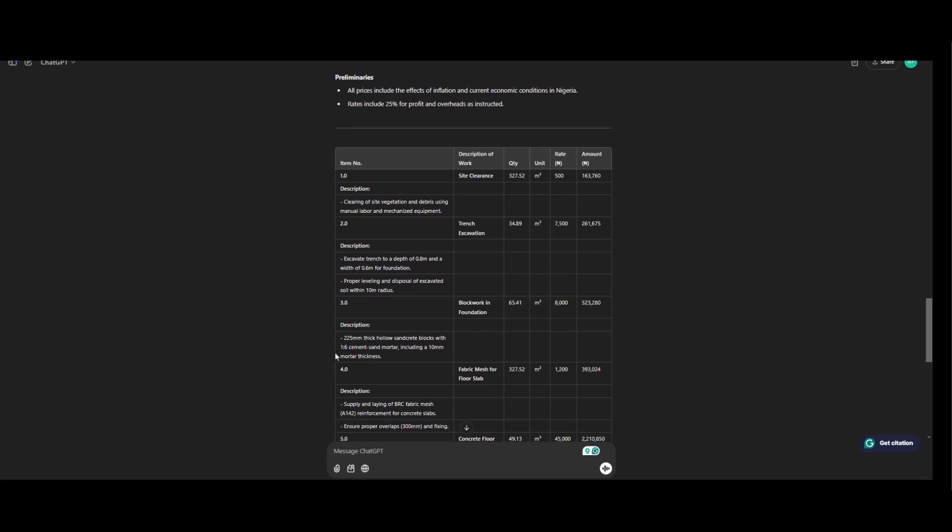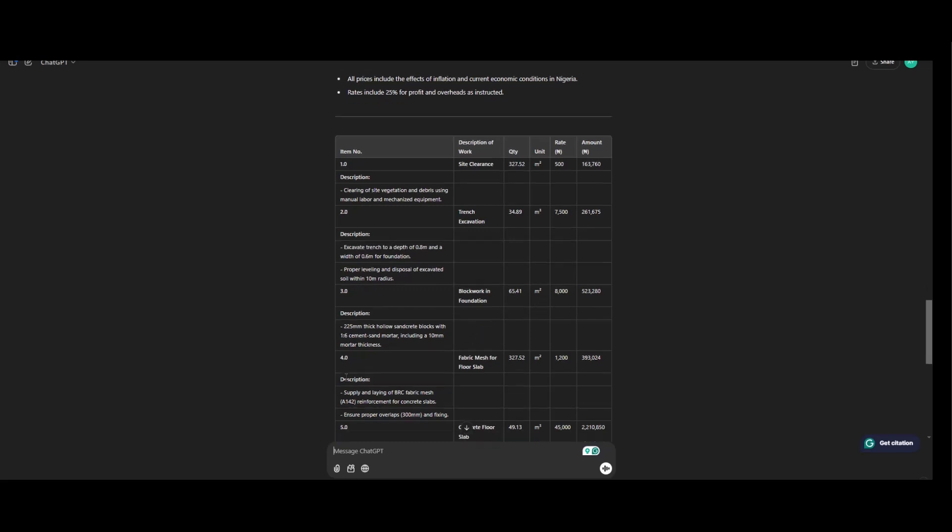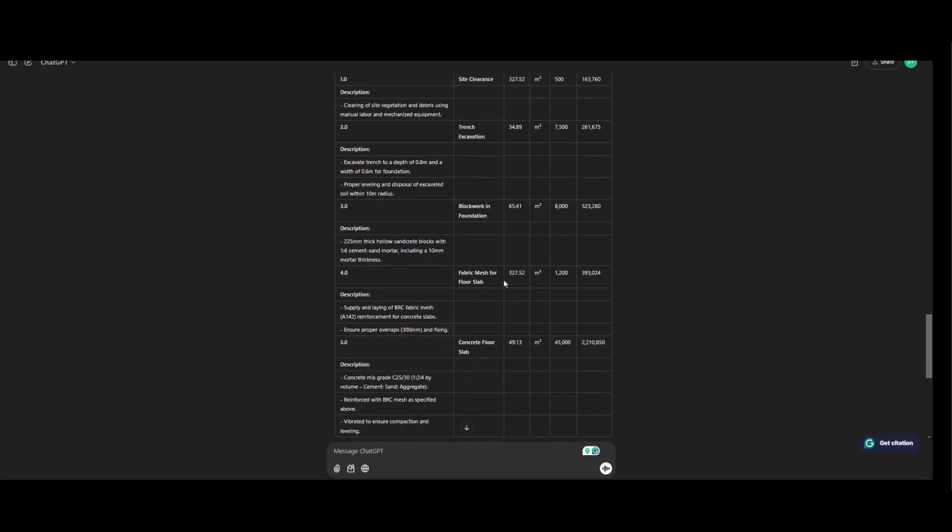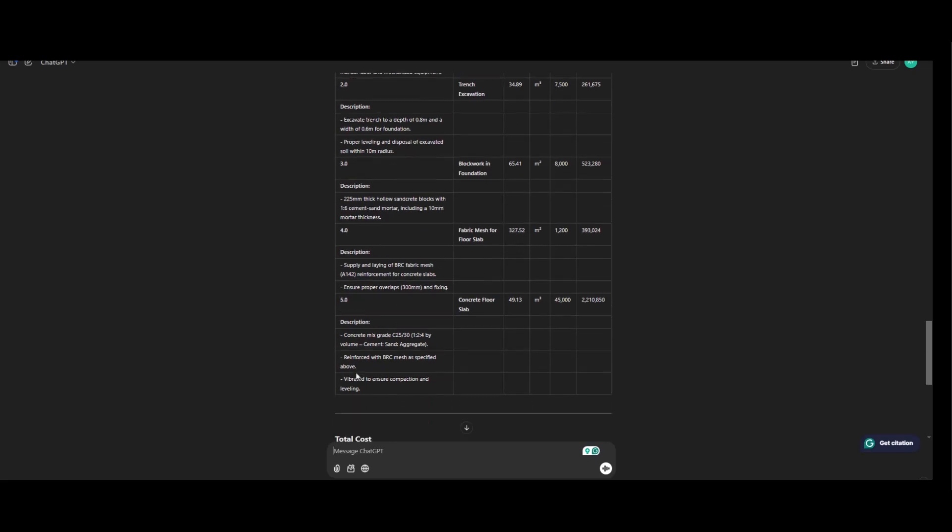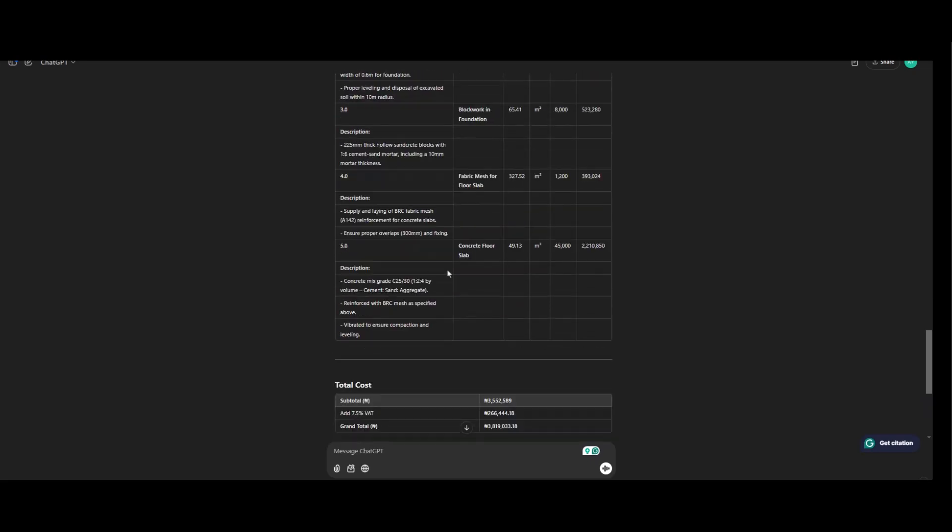Block work in foundation. 225 thick Olu sand grid block with one ratio 6 cement sand mortar. Increased to 10 mm mortar thickness. And this is the price. Description of fabric mesh. Supply and laying of BRC fabric mesh. The code. Reinforcement for concrete slab. This is the total quantity. And this is the price. And is measured in meter square. So and the last one.